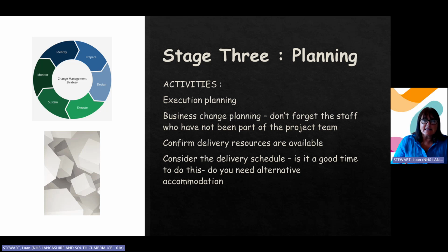Make sure they understand the plan, why we're doing it, confirm that we've got any resources available, things can be delivered if they need to be. Consider that delivery schedule. Is it a good time to be doing this? Are we doing something in the middle of flu season, when perhaps that's not the time because half our staff are involved with that? Can it be delayed by a month? Do we need alternative accommodation while whatever project is happening is happening? And if so, have we made a plan for that?